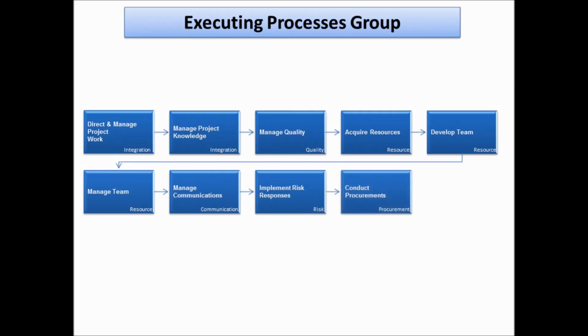Moving on to the next one, which is conduct procurement. This is where we carry out the bidding process by having the bidder conferences, by reviewing all the proposals that were received, that were sent in, and selecting the right seller for the project.